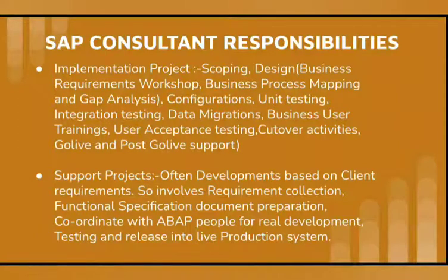Generally, post go-live support will be for 1 or 2 months. That is the general duration. And here change management is very important, because the company needs to adapt to the new business process without any problem after go-live.